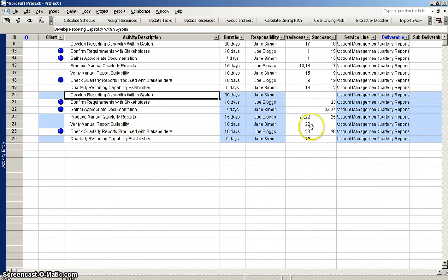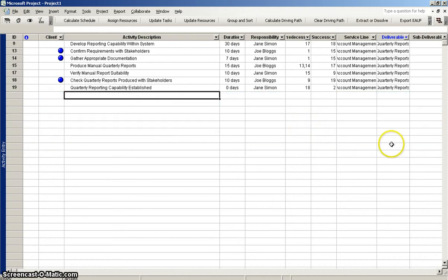Sometimes it will copy them, but it will catch predecessors and successors that are completely unrelated and really shouldn't be there at all. So it can be quite misleading. So that's just one thing to watch out for when you do the cut, copy, paste feature.